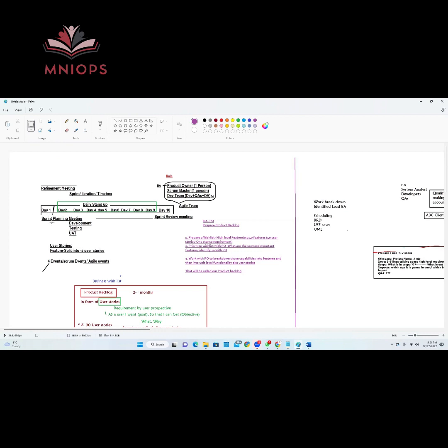Then the Scrum Master sees the team capacity, because each 5 to 7 members have 80 hours total to spend, and 20 hours of kind of analysis gap. So basically they have 60 hours of coding or testing time.